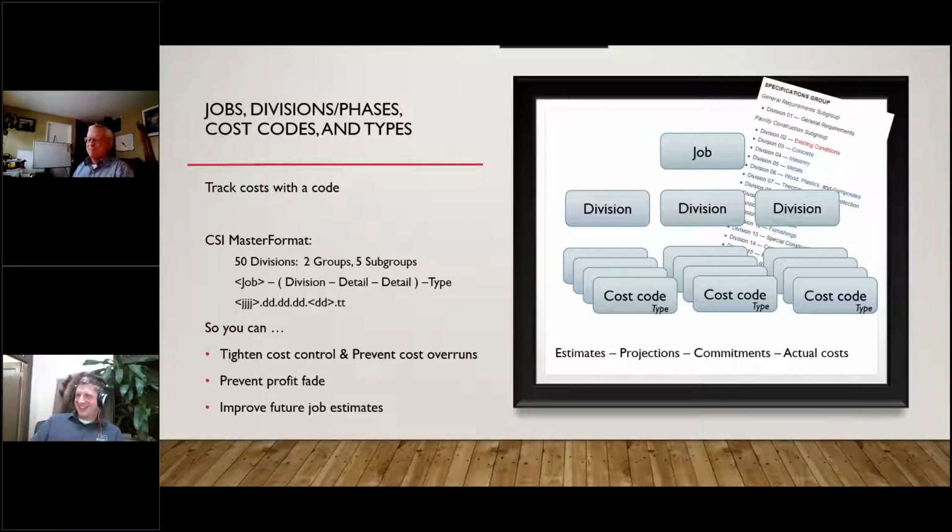Yes, I would argue yes, but we all fall into the trap of, well, we'll just kind of slide it in and we'll get this thing done and we'll come back to the owner later and try to recoup some of our costs. We'll just take care of it because we don't want to disrupt things. Or I don't have time to deal with the back and forth with the owner and make sure it's all clear. Well, that's a leading cause of profit fade, and profit fade is a big cause of companies going out, or warning signs that companies are in trouble, and that can be directly tied to change orders not being approved, invoiced, and collected.